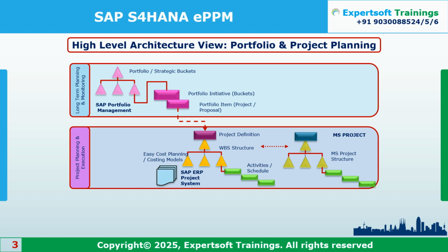Not only for one project, it will be multiple projects. So one bucket could have multiple initiatives, and one initiative has multiple projects. Yeah, it is a one-to-many relationship between the bucket and the initiative. Buckets to initiatives, initiative to items, or items directly to bucket.